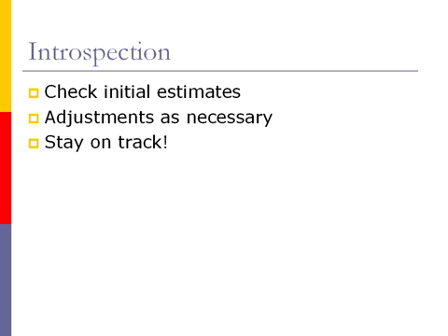Using project control to monitor progress can help see if the initial estimates of project duration, or even costs, were accurate. Also, project control methods can highlight areas that might need adjustments. If the expected duration is found to be longer than planned, the project manager might need to ask for an extension from an authority. Overall, project control helps project managers stay on track with the project.